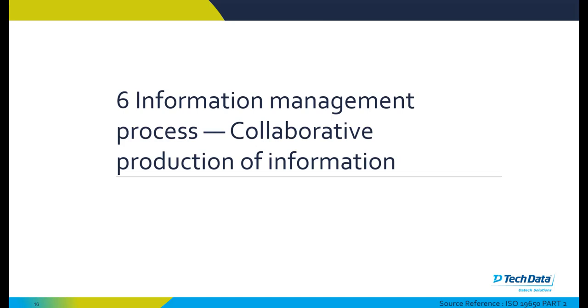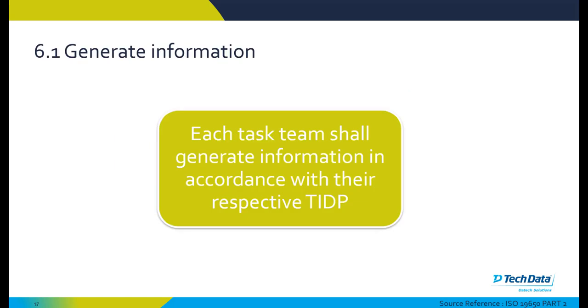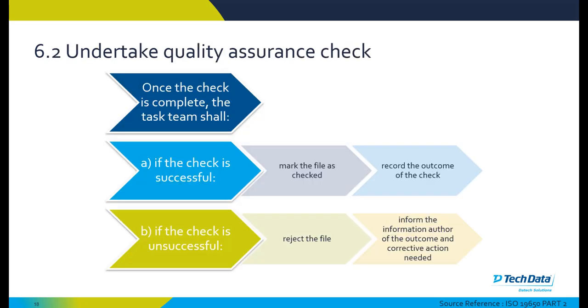Skipping over mobilization stage and moving on to stage six, this is the information management process or collaborative production of information. Each task team shall generate information in accordance with their task information delivery plan. Each task team should undertake quality assurance checks. Once these checks are complete, if the task is successful, mark the file as checked and record the outcome of that check. If the check is unsuccessful, reject the file and inform the information producer or author of the outcome and corrective action needed for that particular file.